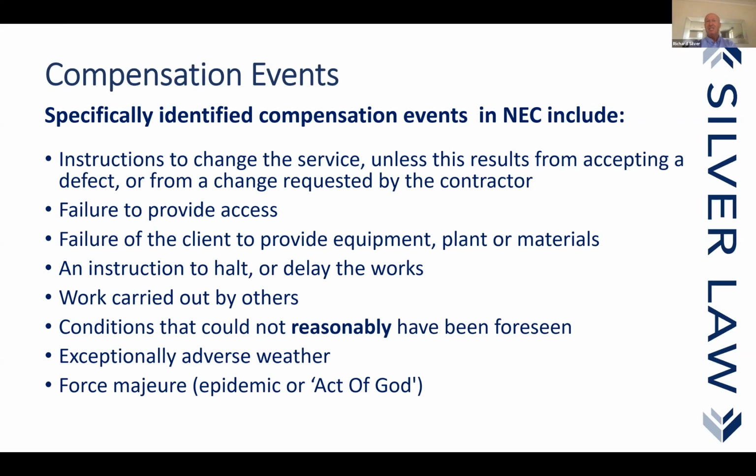Now that program in itself is not simply a program. It is a more onerous program, I suggest, than most contractors issue under JCT. It must have things like critical path and float and the like. But it also includes method statements, health and safety risk analysis, and lots of other things. So we've got a huge amount of information that the contractor has to issue. And it's my experience more often than not that if the project manager really wants to be difficult, you can find almost a reason for rejecting each and every program, because it is so onerous on the contractor to provide the program that matches with the contract requirements. But even where the contractor submits a program in the required format, I very rarely, if at all, ever see it accepted by the project manager.